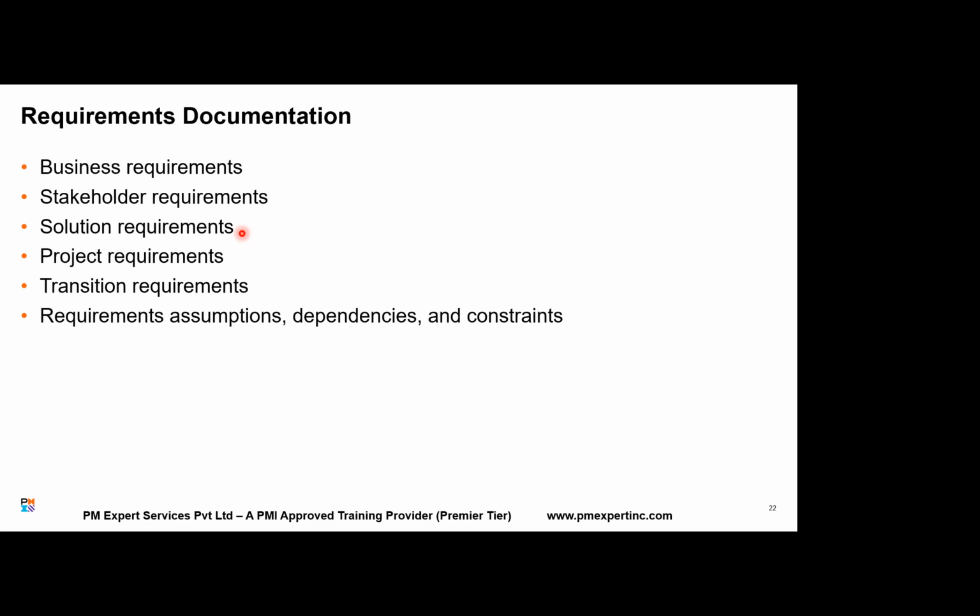Now, what is the difference between fit for purpose and fit for use? If a banking website has all the functions for you to transact, is it fit for purpose? It does perform all the functions. But if it crashes when the load is heavy, if it crashes multiple times in a day, is it fit for use? No. So this is an example when something was fit for purpose but not fit for use.